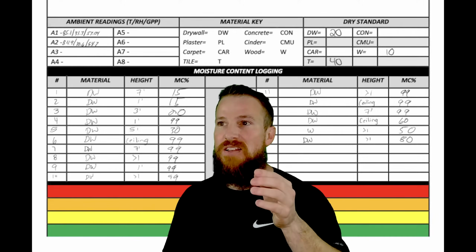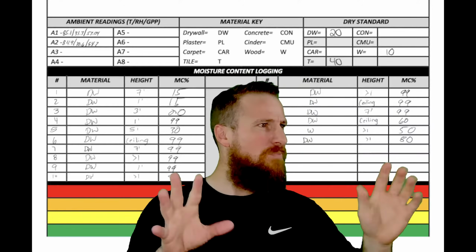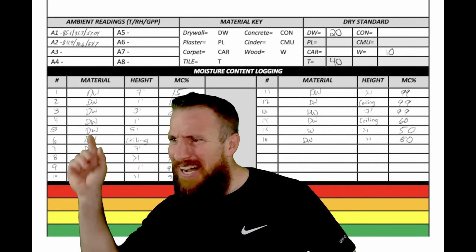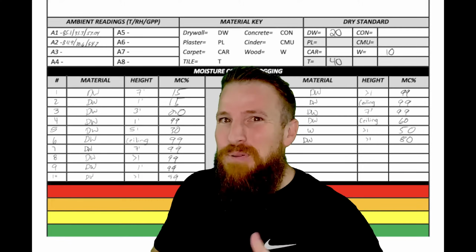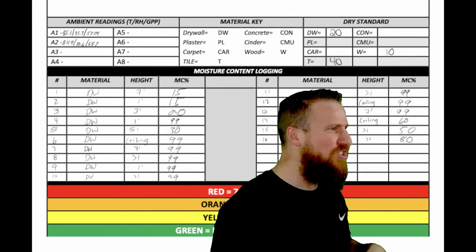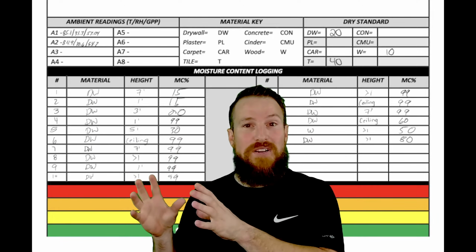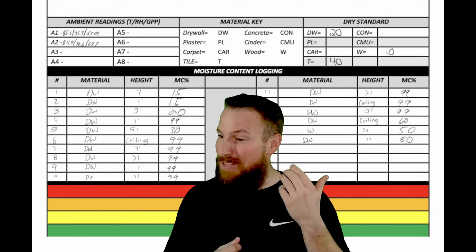So again, what this is super helpful for, putting yourself in the remediation contractor's shoes, is let's say I was out there yesterday. I took my readings. I set up all the equipment. Everything's good. I made all my marks. Everything's great. But I leave and tomorrow Tony's coming in. Tony's not bad, but Tony's not me. Here's the cool thing. Doesn't matter if you're Tony, Josh, Sheila or Jason. No matter who comes in has a quick reference in the form of a moisture map that's going to be left on site, so they know exactly where to walk and check for the moisture concentration reading.